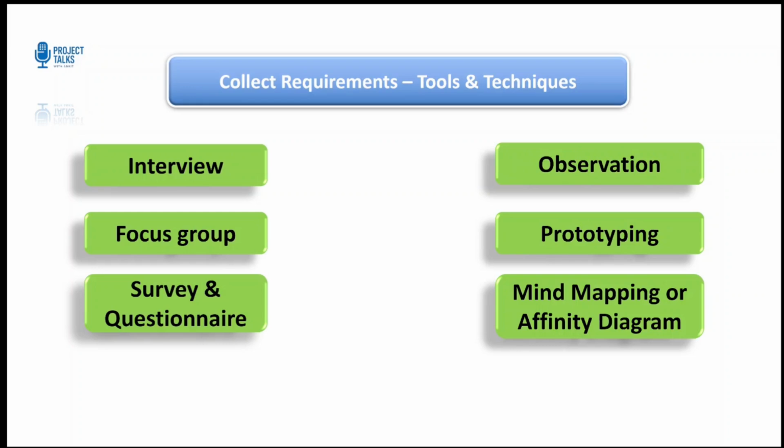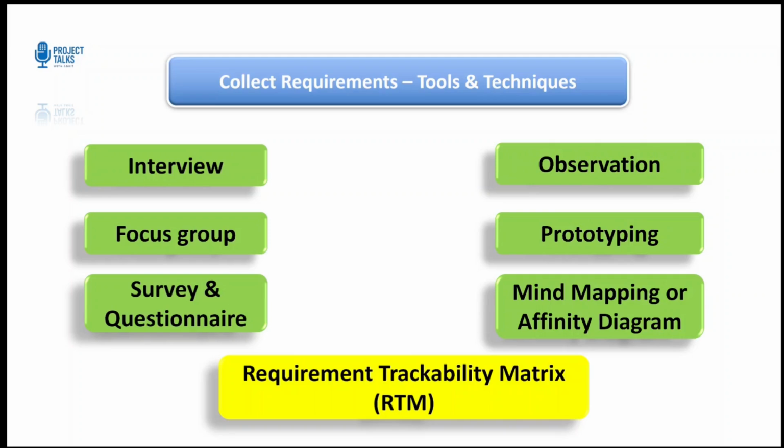And one of the most powerful techniques is the requirements traceability matrix, or RTM. It links every requirement back to the business objective and forwards it to the deliverable that fulfills it. Let me give you an example.